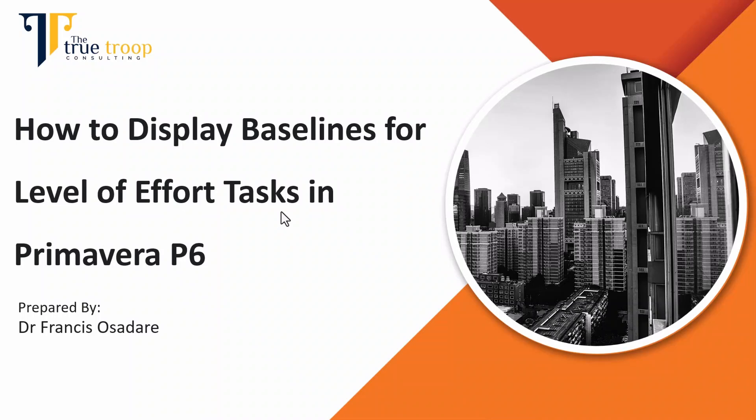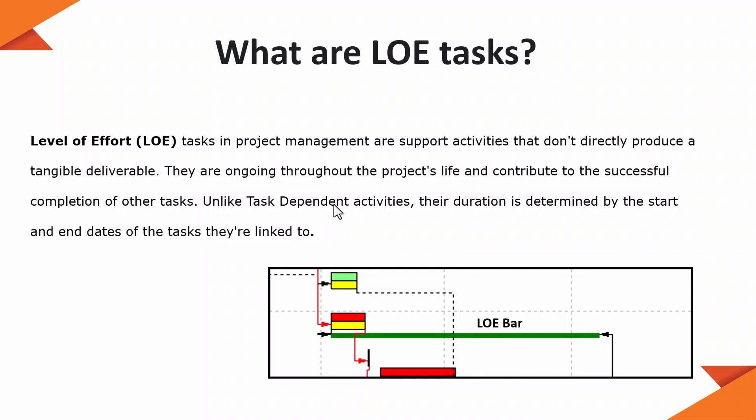Let's see how we can display the baseline for level of effort tasks in Primavera P6. Before we go ahead, let's define what level of effort tasks are. Level of effort tasks include management and support activities that do not directly produce a tangible deliverable. They are not on the critical path — they are always ongoing throughout the project life cycle, or throughout a particular WBS.